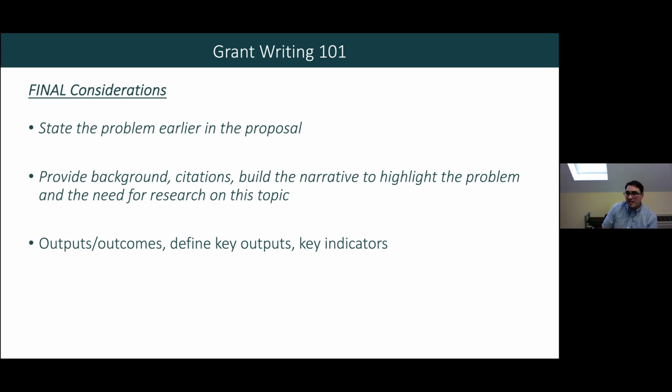And then think about the key indicators. Many grants start asking us to think about what could be the key indicators. If I'm working on wheat science, key indicators will be the number of times that the farmers apply herbicides. If I get to reduce that, and if 5% of the farmers are more efficient in applying herbicides, that is a key indicator of the success of my grant.